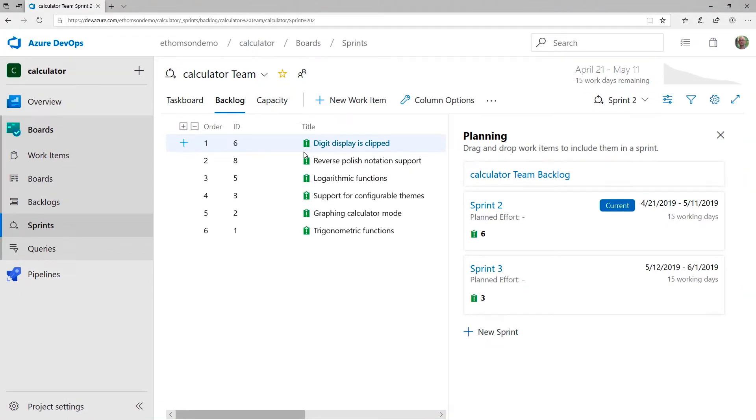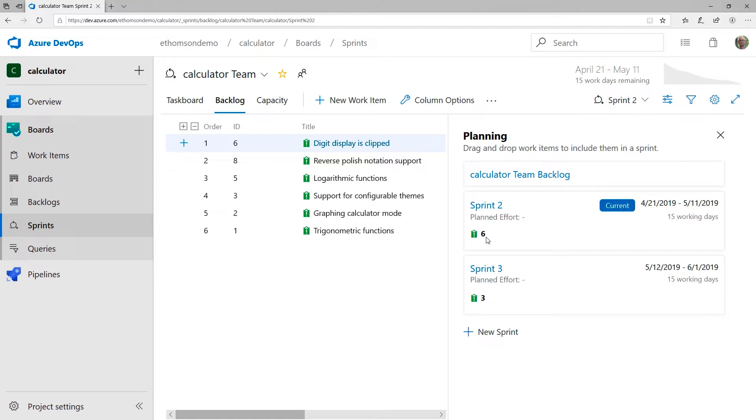And here you can see my work items in a sprint backlog. If I look over on the right-hand side, you can see that I'm in sprint number two and that there are six work items that my team has planned to tackle this sprint. So this gives me a nice overview of everything that's going on in the current sprint.